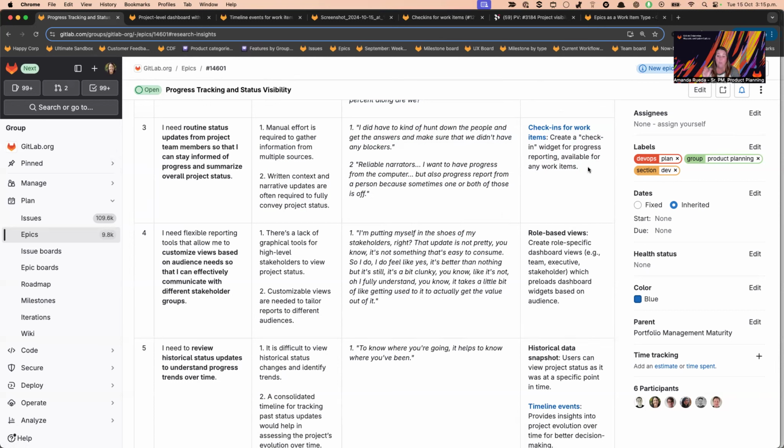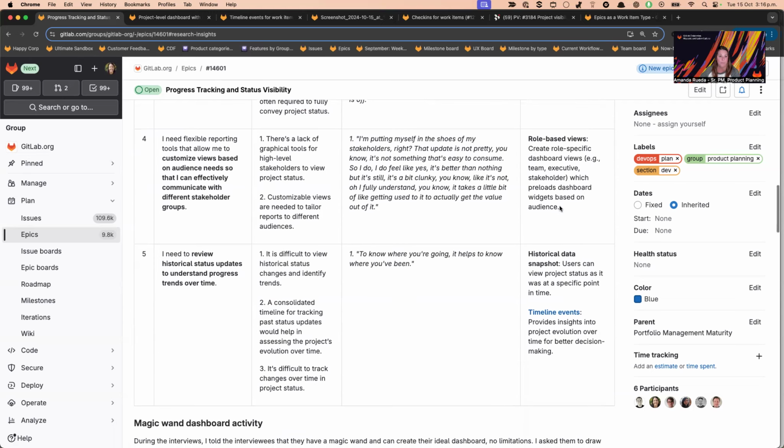And then each level above that, the person responsible for the feature level, which would be the epic, would read all of those check-ins and create their own check-in at the epic level. And then the person who's responsible for a portfolio of projects would read all of the epic levels and create a summary, right, of update that would be available for that portfolio.